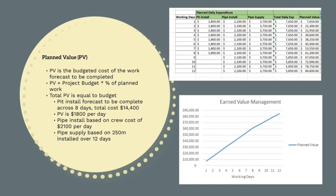Considering we plan to install both drainage pits within 8 days, our planned value is $1,800 per day. This is calculated by taking $14,400 — our total budget for drainage pit install — and dividing it by 8, the number of days it takes to complete the task. So at the end of week 1, our planned value will be $1,800 by 7 days equals $12,600. Our pipe install was planned at taking 12 days at a planned rate of $2,100 per day, so our planned value at the end of week 1 will be $2,100 per day multiplied by 7 days. Our planned value is impacted by both our project budget and when we plan to complete the works, so our project schedule.